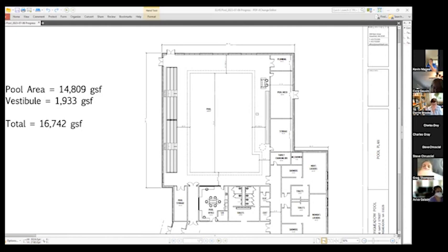Okay, so default, start there. Find out the order of magnitude of the impacts of the added width of each lane, the added width across for the potential to add boards later, and the potential of what a wider pool would mean altogether going to the 8-lane pool.